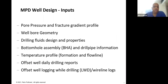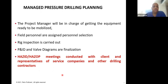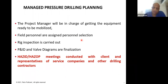Typically, you need pore pressure and fracture gradient data, well geometry showing casing numbers and setting depths, sections where MPD will be used, drilling fluid properties, drill string configuration, temperature profile, and details from offset wells — this is the minimum input needed to start MPD work. A rig inspection is also carried out by the project manager or MPD engineer to see how equipment will be set up on the rig and what connections are available.